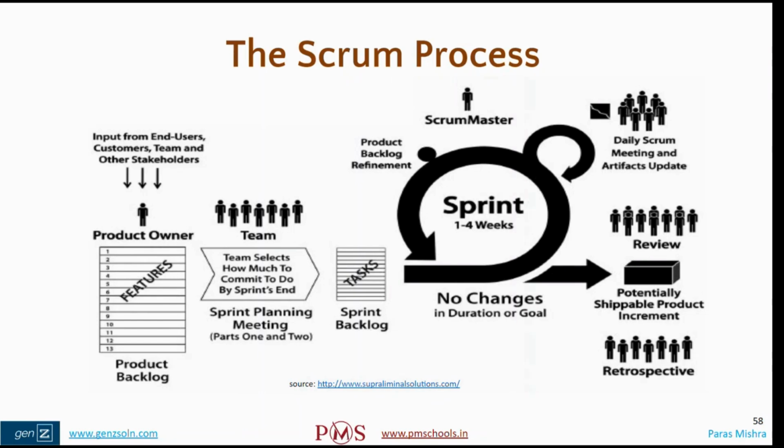So what is the learning here? Next time, try to incorporate the objective risk. Okay, this is a rainy season. Let's see, out of 30 days, 4 days it can rain. Some people may get sick. So let's talk about less capacity or increase the capacity. That is the learning. In the retrospective, what can be done here in the software industry?